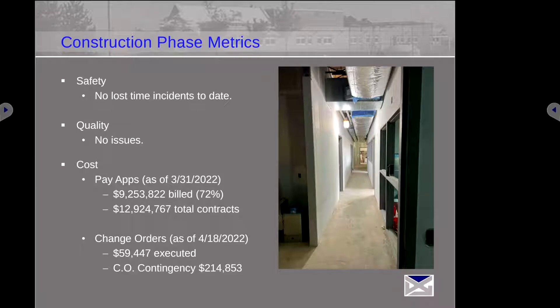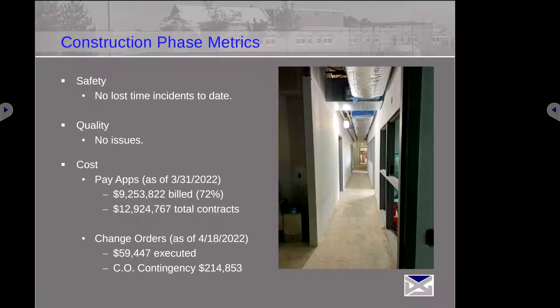We're right where we want to be. We still have $214,000 worth of contingency left, and we've started the windows with no issues. It's a good thing that we can keep a lot of contingency and get you more work done in the school as we get down to the end of the project.